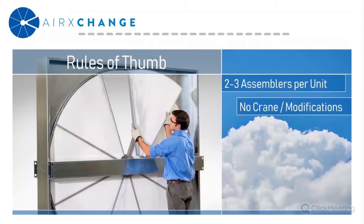Now, there are certain cases where the more bodies you throw at it, the quicker the project's going to be. But those are usually projects where there's multiple wheels being replaced and you can work on them at the same time. But the rule still remains, you typically still want 2 to 3 people per unit. Due to the lighter weight of the devices, in all cases, it eliminates the need for a crane on site and any structural air handler modifications that need to take place as well.